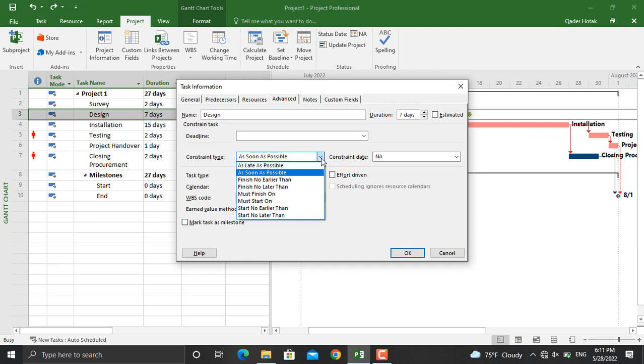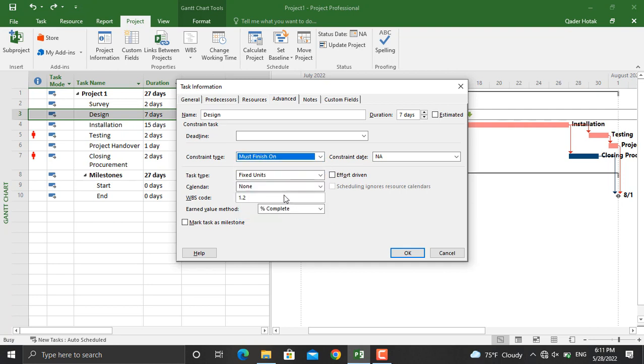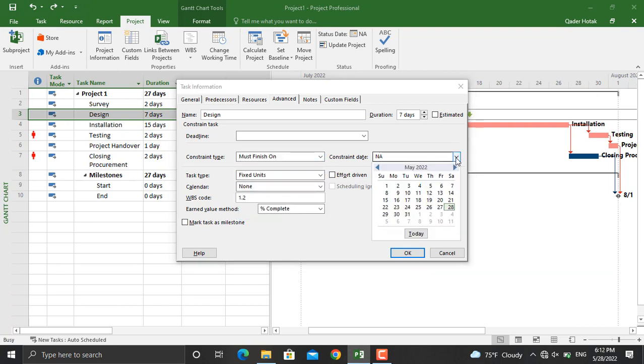In addition, you can assign different types of constraints as well. For example, if I select Must Finish On and select a date for that, the activity must finish on that specific date.